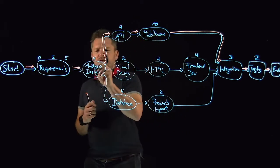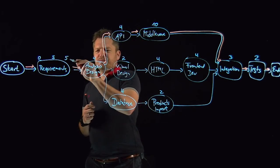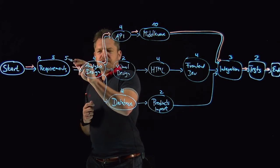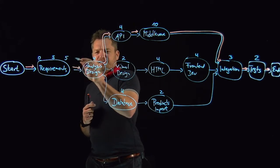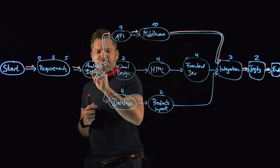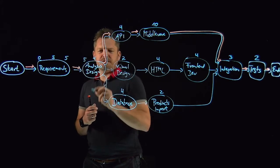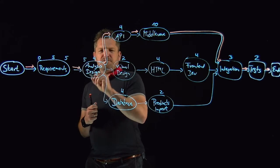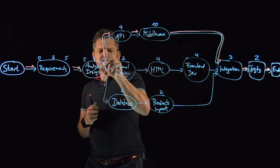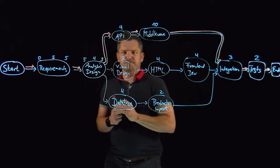So let's go on. Analysis and design as this ends after five days it cannot start before five days of course. So the earliest start will be five. Five plus four days we have nine as earliest finish.